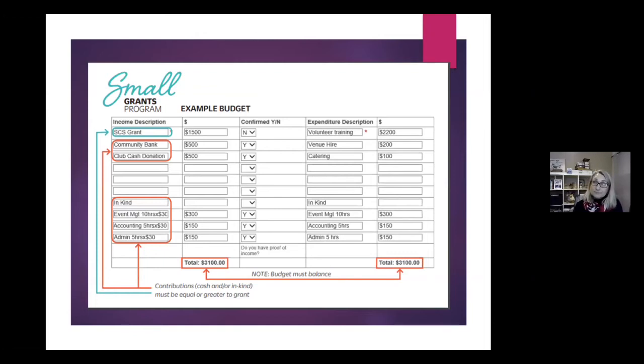Molly asked, would you recommend in the budget to allow for any changes? So, for example, if you need to spend $100 to hire someone for a job, but you say $200 on the grant application just in case the actual price to hire them changes. I know you have to show the actual total expenditure after the project, but is there a way, if you are uncertain before the grant is approved, to put in that amount? Yeah, okay. So you're putting in a contingency amount. You could put on your application 10% contingency and call it that. A lot of grants will allow for that, and you could ask the funder, do you allow contingency, because there's an unknown quantity, and more than likely they will say yes at a percentage.